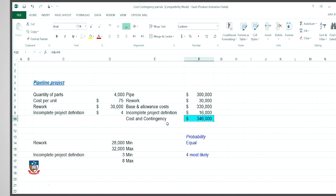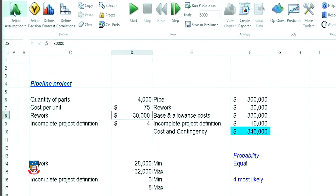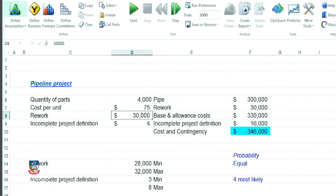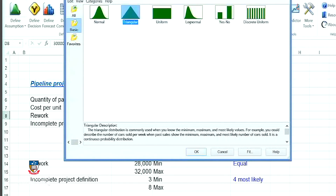Here is where the Monte Carlo software can assist. So if I now open up this particular software, you can see that it appears to sit over the top of the spreadsheet and has been designed to give it a boost. What I am now going to illustrate is, with the assistance of the software, undertaking 5,000 what-ifs. To do this, I first need to let the software know what it has to do — we call this defining the assumptions. So for rework, I click on the define assumption.